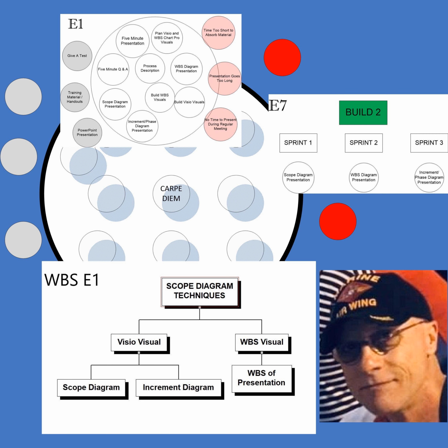Amazing. So if you can write down the topics of that report, it's easy to make up. Think of what you're going to need. The servers and the racks are hooked up a certain way at the current location, and whatever plugs they're using, whatever current and voltage they need, it's got to be the same when they get there. So everything has been designated as space at the new location, and you have to go out and check that. Before the move, we'd have all these reports with us, and we'd make sure the right power was in the right slot for where they were going to go.